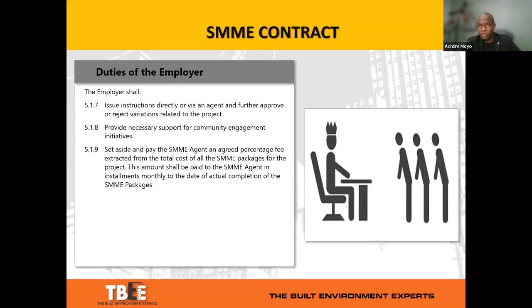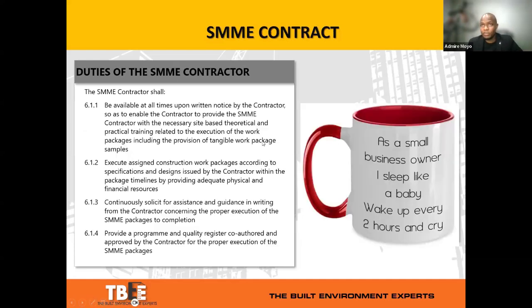Then the contractor also has an obligation or duty to support community engagement initiatives, which includes a recognition of the cost factor as well, time and cost factor as well. And another duty is to set aside and pay the SMME agent an agreed percentage fee extracted from the total cost of all the SMME packages for the project. So that goes to that fee aspect of saying, well, as an SMME agent, whatever role you're undertaking, in rolling out the project or managing those SMME packages or SMMEs, there is some form of cost to it.